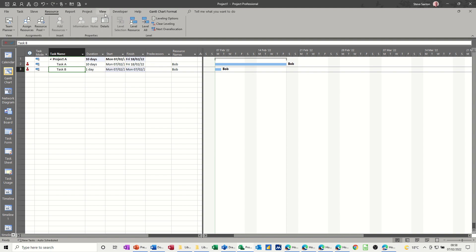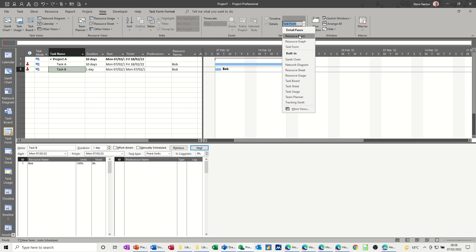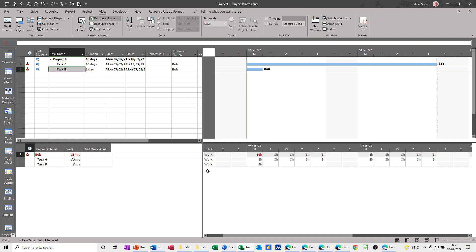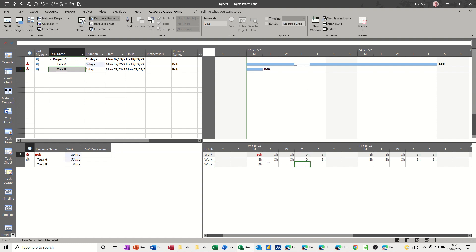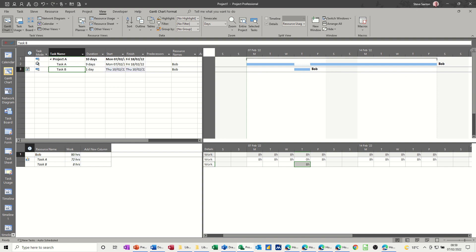You can also split the screen. I'm going to the View tab, ticking Details, and I want Resource Usage underneath. Now it gives me the breakdown in terms of hours. So let's say I want to split this task on Tuesday — if I just put zero in there, you get the split. So Bob is on that task all the way along but he's not doing anything there. I could move that task into that slot and he's no longer over-allocated.